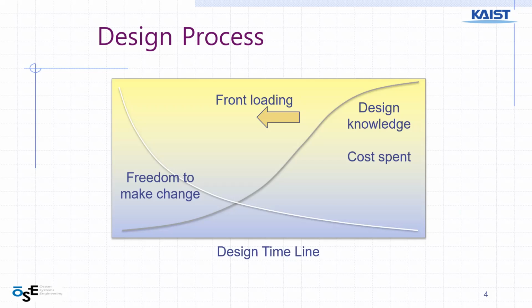At the beginning of development, there is very little knowledge, and the money spent is also very small. But it increases especially when production starts, in the middle or just after the middle, where the curve goes up steeply. Much knowledge is gathered, and much money is spent during the early stage of construction.